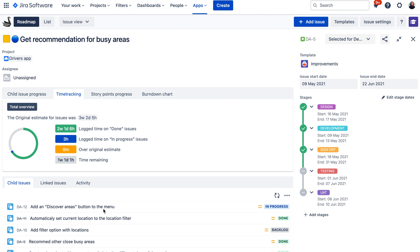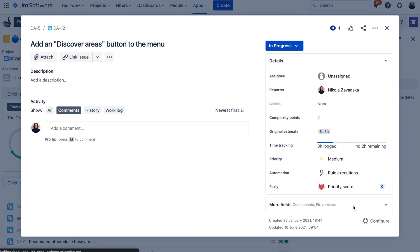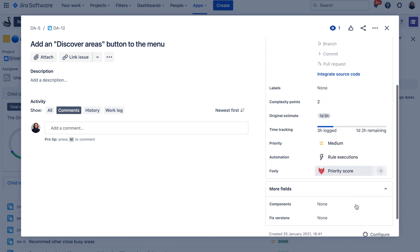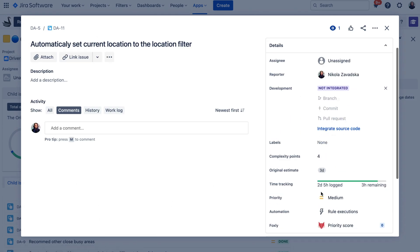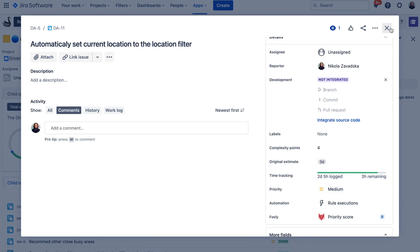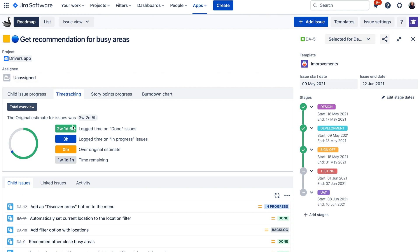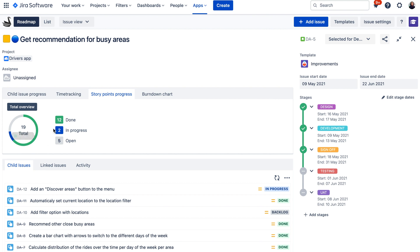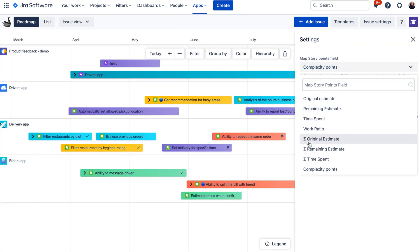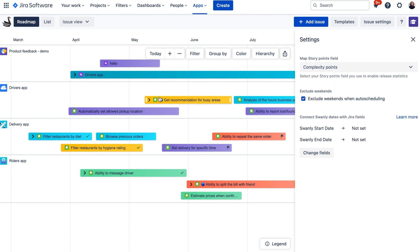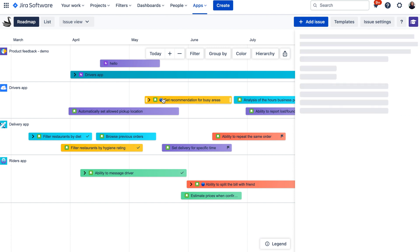There is also a time tracking option if you are using Jira's built-in time tracking — the original estimate field and the time tracking field — where you can see time spent and time remaining. Swanly summarizes this information across all child issues and shows you the high-level original estimate, how much time was done, in progress, or overdue. There is also a story point sum-up where you can see the high-level progress of your story points. The story points field is customizable — you can select any numeric field in Jira, such as complexity points or priority score, to be used in these reports.